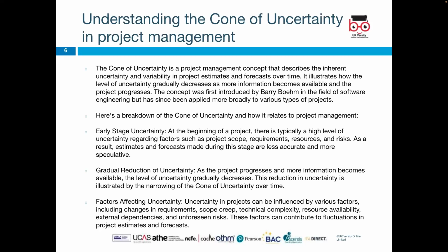Gradual reduction of uncertainty. As the project progresses and more information becomes available, the level of uncertainty gradually decreases. This reduction in uncertainty is illustrated by the narrowing of the cone of uncertainty over time.